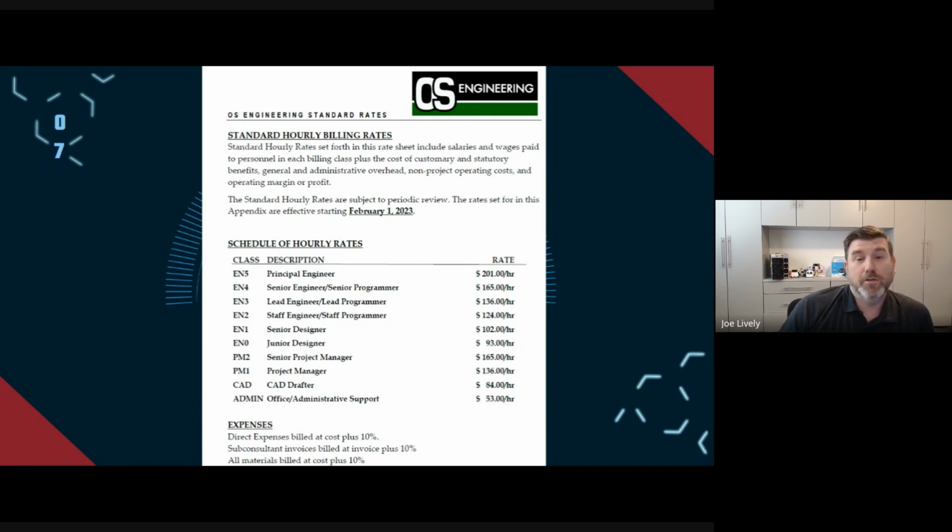For the quote. So that would have been the time for them to look at what it would cost to build it out, what it would cost to acquire the cable, what it would cost to hire the labor, to basically run the project. Was just under $9,000. At the end, I turned them down, obviously, but I asked them, you've done these projects before for other people along the Columbia River and stuff. What does a project like this cost? He said to run the project, they charged one group $300,000. Now, that's not equipment. That's their engineering designs. That's their project management. That's their people that they hire to run this particular project.